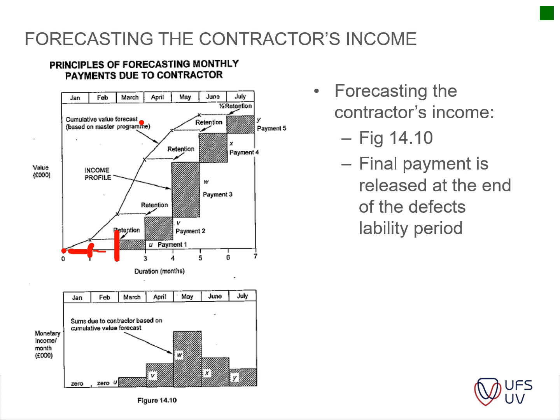continue with your work, so your cash flow continues to be an outflow, and then only after the second month you get your first payment. Okay, and then you put in your second claim, and that claim you only receive in month 3. Okay, and so forth. So you can see it's also on the previous month's work that you've done. So there's a continuous deficit that you have as you go along. Okay, then monetary income. This is just a bar graph of the above.